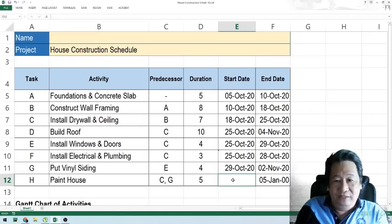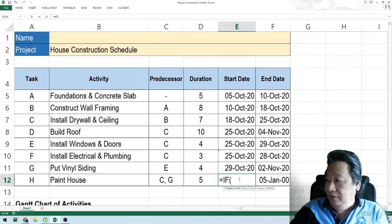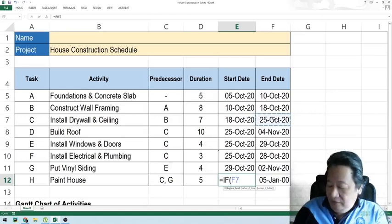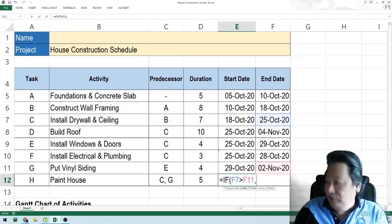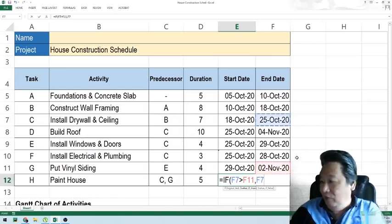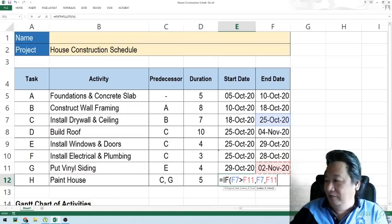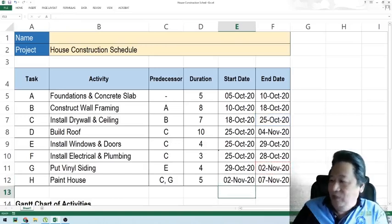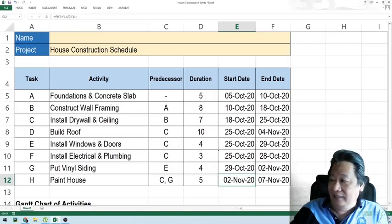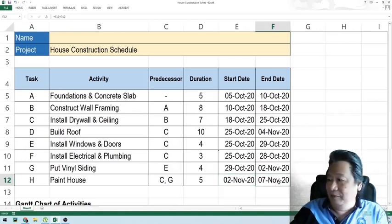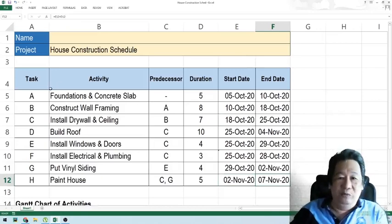For Activity H, we will learn a conditional IF-THEN-ELSE statement. We say: if C (drywall) ends later than G, then use November 2; otherwise it starts after November 2. The computer shows November 2, which ends later than C's October 25, so that is correct.